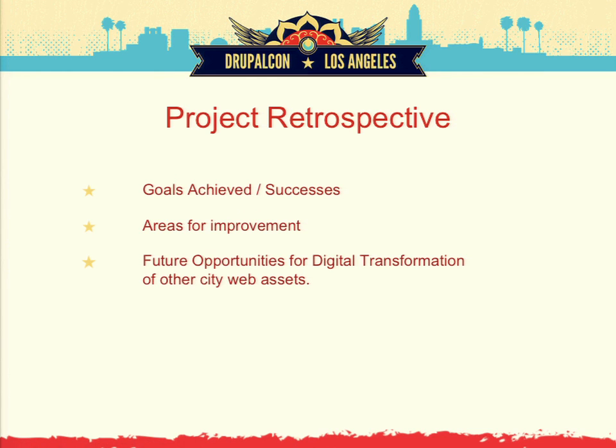It was a little bit of a challenge because we were working with a lot of different departments who all operate on different schedules, and ensuring that we can get the data in time, because you've got to start figuring out how to get everything imported. So I definitely would recommend nailing that stuff down as early as possible. And we did not get to implement any automated testing, which was a real bummer. I definitely would put that at the beginning of the to-do list for our next project.